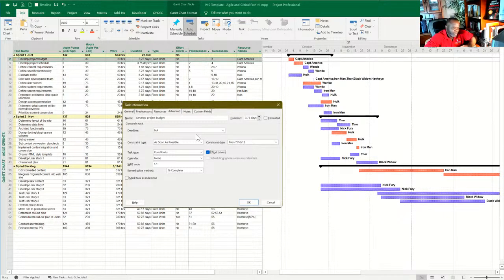So, Jam, for your big project next year, instead of using some of those constraints, you could also look into using deadlines. So that could be a good tip. And the way deadlines work is different. Instead of having a constrained schedule, all you have is a green arrow pointing to when it should be. And when you're off, you can see. Can you show us one of those deadlines, Darrell?